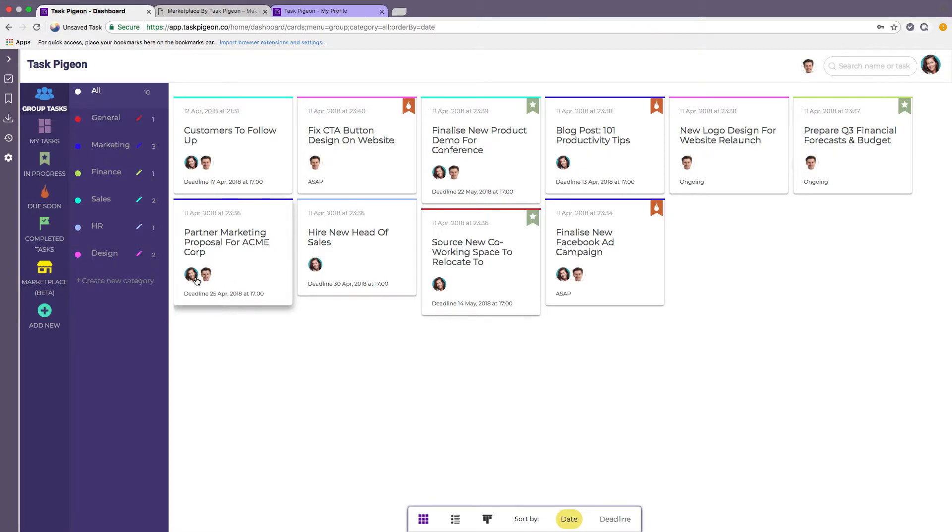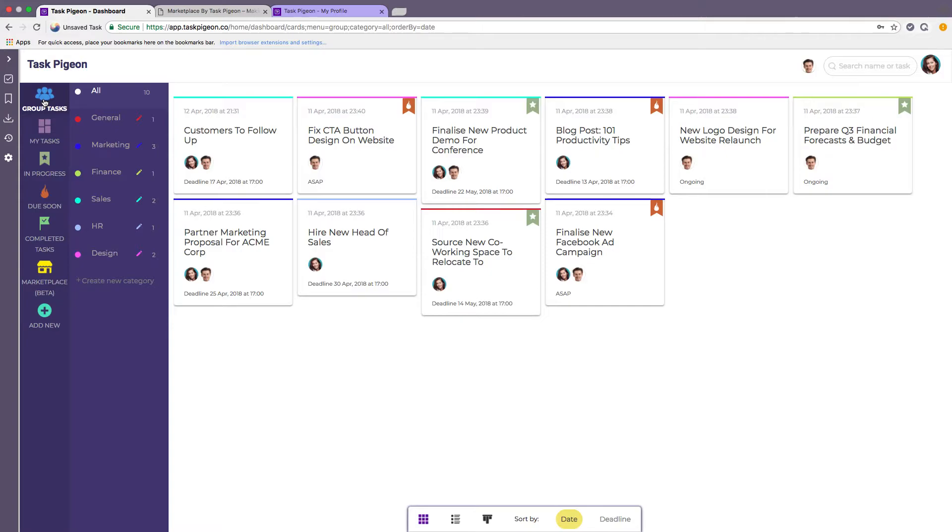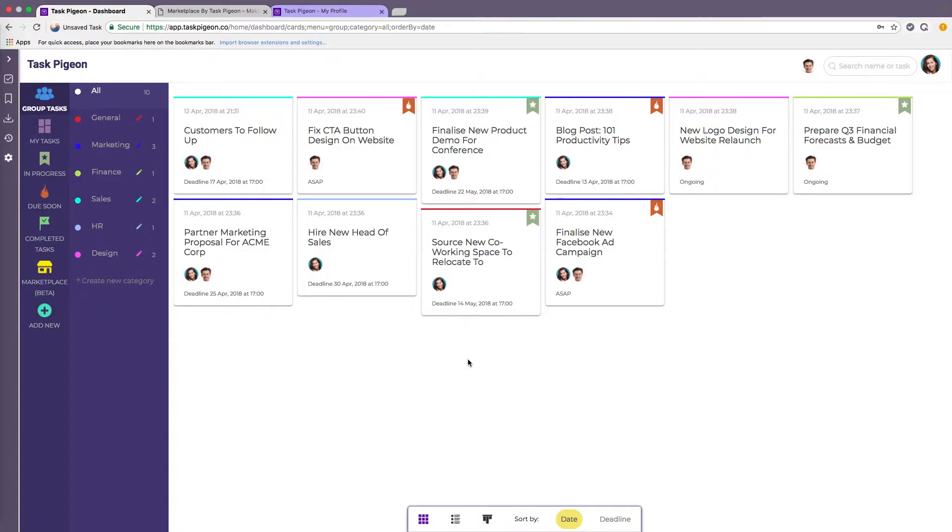One of the key differences of Task Pigeon is that we like to split our tasks by the group task dashboard and the my task dashboard. So with the group task dashboard essentially what that means is that any task assigned to any member of your team displays here. This allows you to very easily see who is working on what in your team and get an idea of if one staff member has too much work on or if someone else perhaps has some spare capacity and can help out.